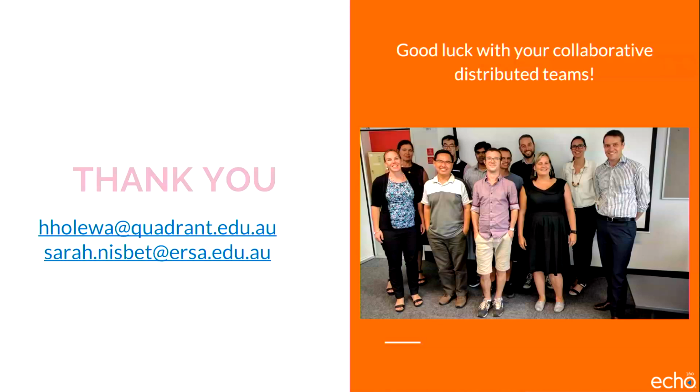Yeah, so I've had a project where we just had to stop work. It had to be that drastic. We had three teams, one in Brisbane, one in Sydney, and one in Townsville, and everyone was working towards a different goal. To get enough imprimatur to change that kind of culture, we had to put down tools and stop work for a whole week and get everyone together. If you're not focused and you don't have that communication happening all the time, it can go awry. So there's been elements like that.